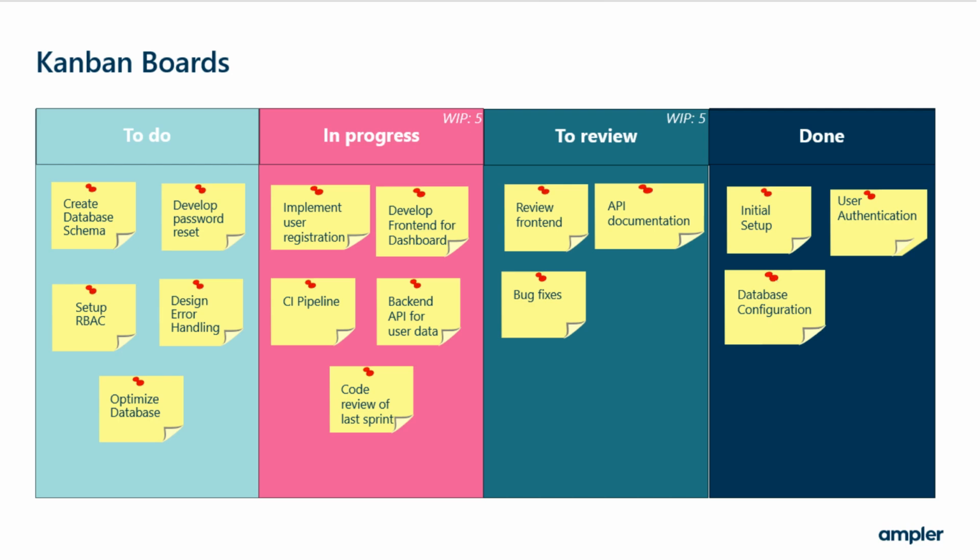It helps prevent overloading. Sometimes Kanban boards can include swim lanes, which are horizontal rows that separate work or teams within the project. Kanban boards are way more flexible than a Gantt chart as they focus on a given number of tasks and not fixed timelines, allowing for easier adaptation and change in the project, making them ideal for iterative or agile projects.